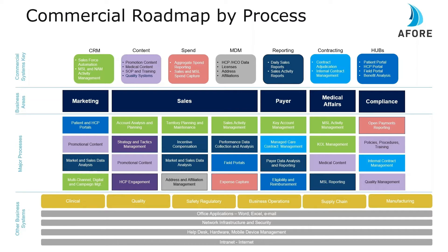Before moving on, when should an organization get started? Ideally, the commercial roadmap strategy conversation should start 18 months before your planned launch date — your PDUFA date. Each individual piece will start according to your launch plan, as certain things take longer than others. A hub takes longer to launch than a CRM system, but there are dependencies. At 18 months you should create your plan, and if you're not executing 12 months before your launch date, you're behind schedule.